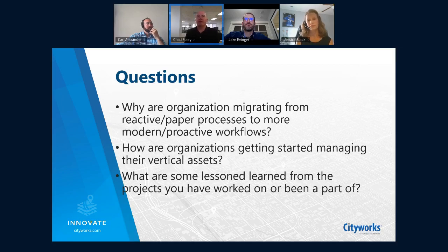So the biggest lesson learned was really just understanding the asset landscape for the treatment plant in this example. What really is an asset? It's easy to get bogged down at such a granular level. And while you want to capture all those things, it may suffice to do work orders to a room instead of to all the different objects in the room, or just tie the work to a building and not get it down to the water fountain, just for simplicity and sanity. Defining what is an asset is not to be taken lightly at all.